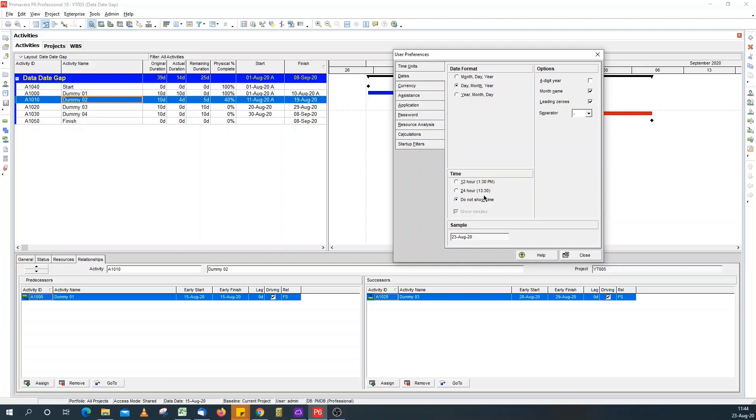When updating my schedules, I always want to show time so that I know what I'm dealing with. Because the Primavera database works with hours, not days. So, the days that are displayed in the layout is just a conversion using the factors and the time period factors.